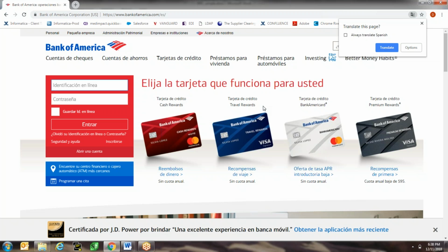No, because this website is built using certain technologies, certain standards, which are compatible only with certain internet browsers, certain versions of internet browsers. At least Internet Explorer version number 7 should be used. At least Google Chrome version number 8 should be used. Anything older than that will not be able to support this website and will crash. Is that an assumption or a dependency? You decide. Sounds like a dependency to me. It can go either way.